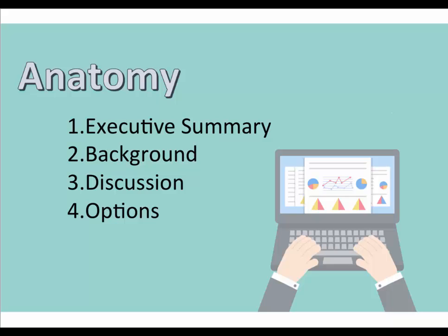So it's a really good opportunity to actually twist that and be a little bit manipulative about it. Option 1 is your perfect solution. It's everything. It's the gold standard for what you want, all the bells and whistles. And then you've got a fallback position. You truly think about, if I couldn't have everything that I wanted, what would I be happy to take out? And then offer that as my fallback so that at least I am delivering patient education, just maybe not for now the way I wanted it. And then option 3 is the do nothing option.